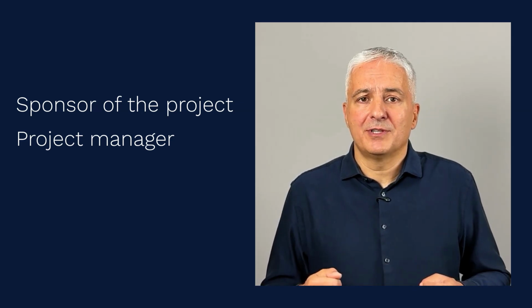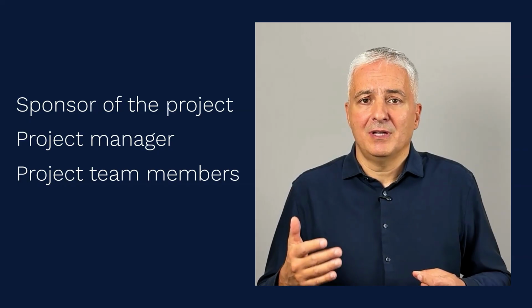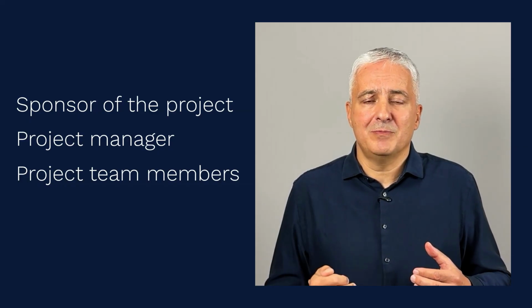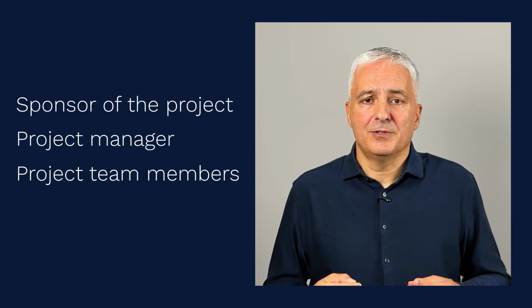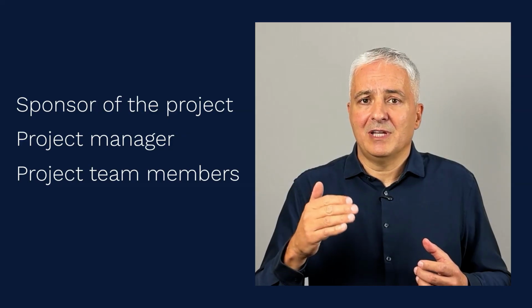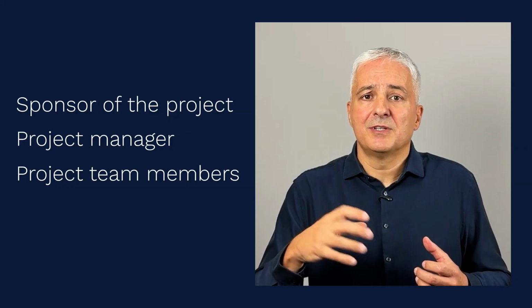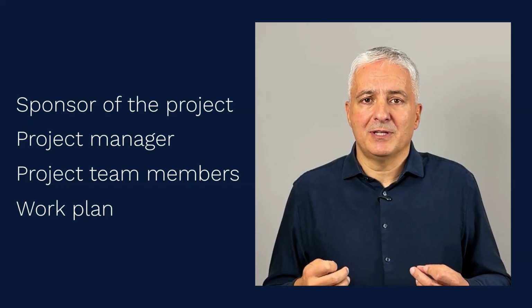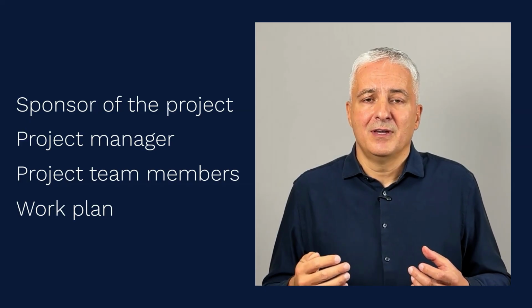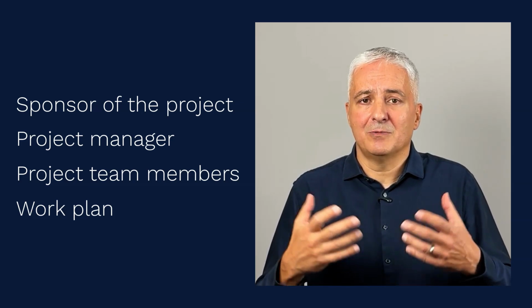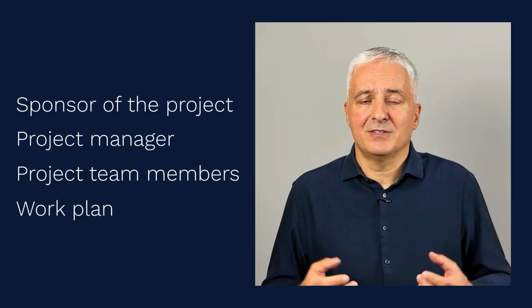You should also define who the project team members are. And this project team is usually not needed for small companies, but if you have a mid-size or a larger company, then this is certainly very good to have. And typically these project team members will be mid-level managers from the departments that are the most involved in this kind of a project. And you also have to go through this work plan that you presented to your clients in the phase when you were making the proposal and once you signed the agreement. So you have to go through these details and refine whatever needs to be explained and clarified.